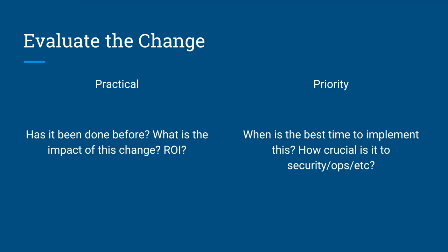After submitting the change request document, it's time to evaluate this change. Some questions to consider as the evaluation process is going on: Has this been done before? Will this be done in the future? Is there something that they are missing in the implementation? What is the risk associated with the change? What is the impact of the change? What is the impact of not performing the change? What is the return on investment?